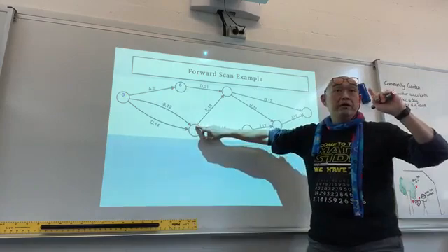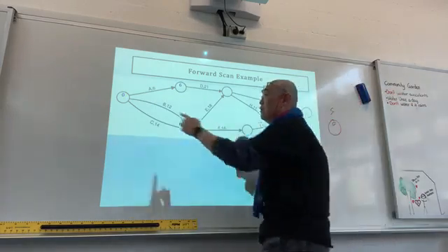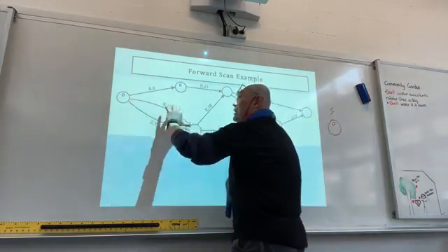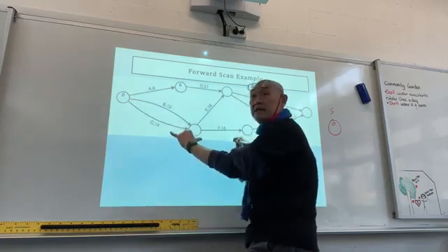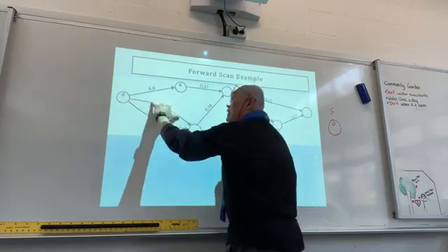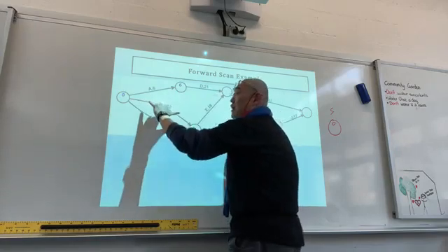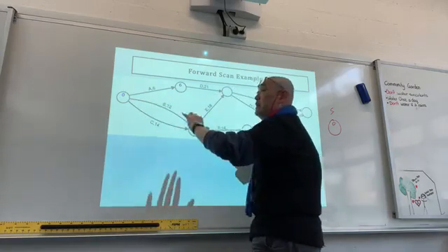So what number should that be? 14, because with B, you can see that we may not have to start at the same time, correct? We have spare time, or we call it slack. I'll talk to you about the word slack a little bit later.